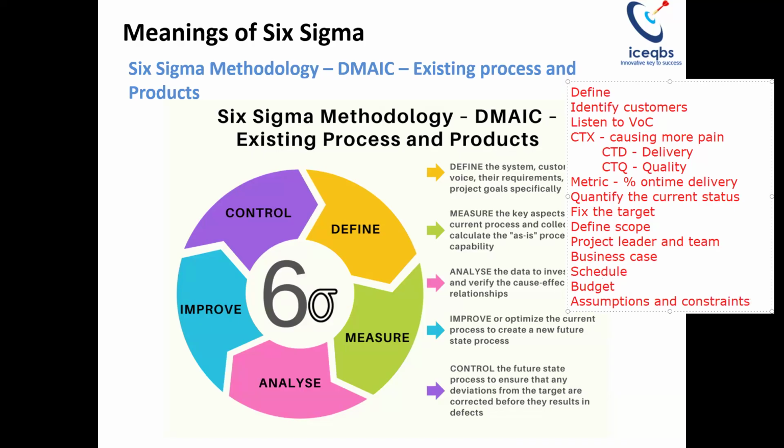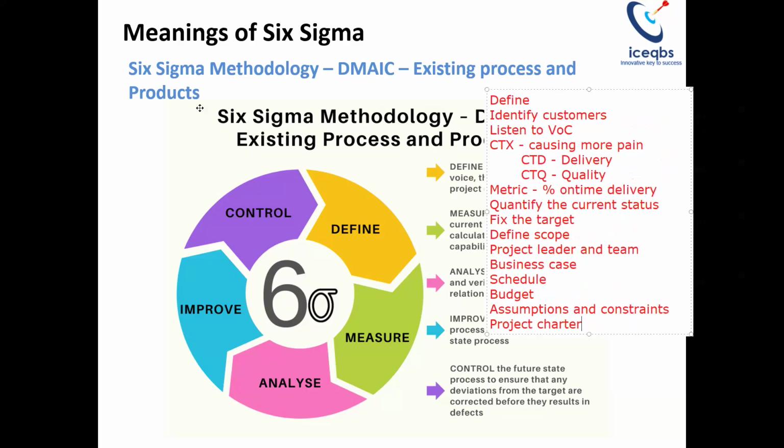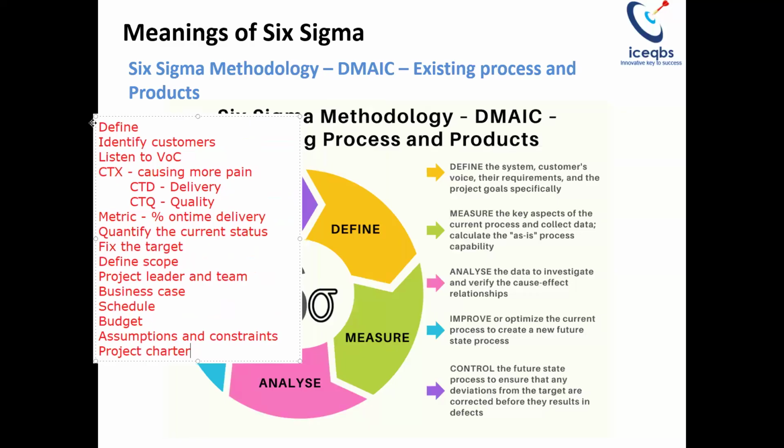So document the high level assumptions and constraints. You document all these things in a single page document called the project charter. So the project charter is the major deliverable from the define phase, right?